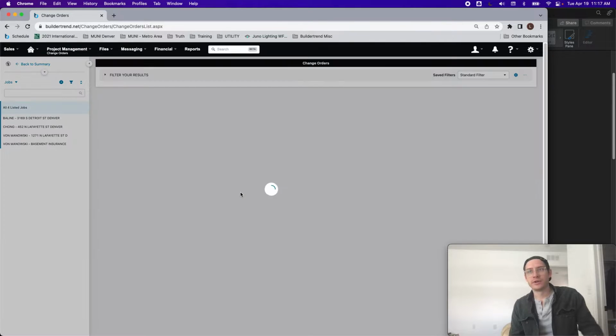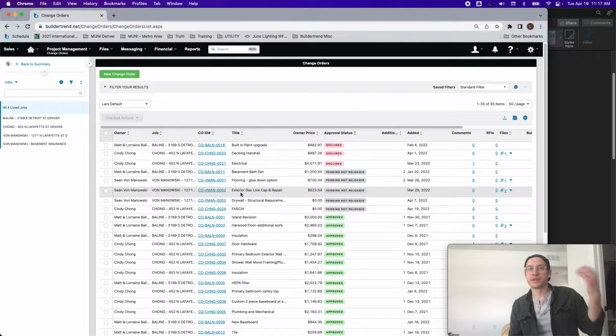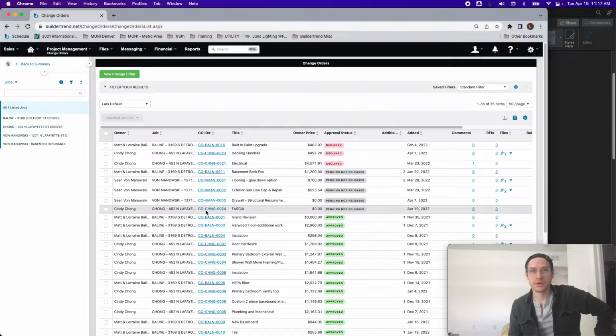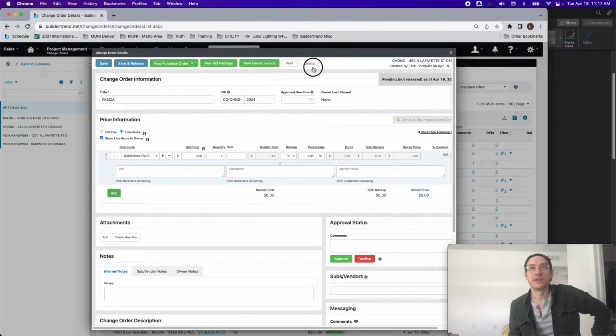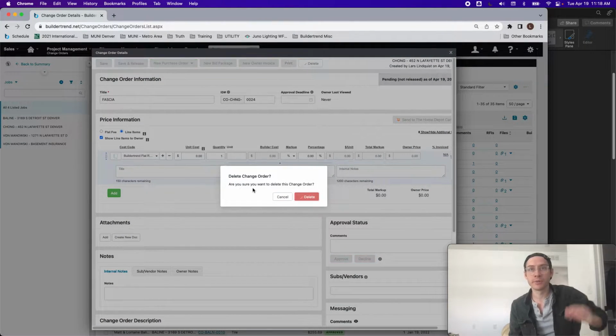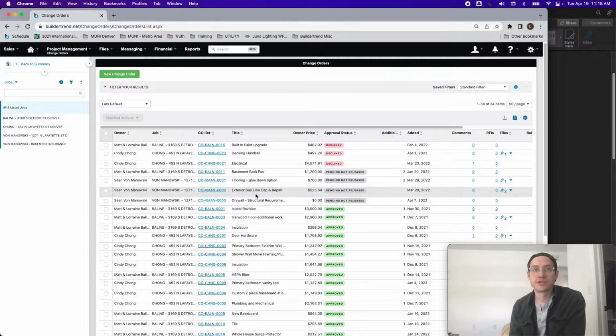So let's say today's Tuesday, and I did that yesterday, Monday. All I did was create an empty change order. Well, today when I come to review my change orders, it's going to be hard to forget that change order is necessary, which seems ridiculous, but whenever you have so many change orders and so much movement across multiple job sites, it does become pretty easy to forget the need for a change order. So I want to make sure I'm reviewing all the needed change orders every day.